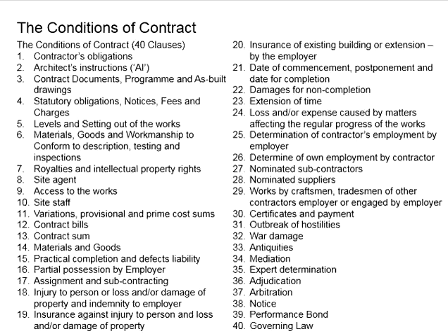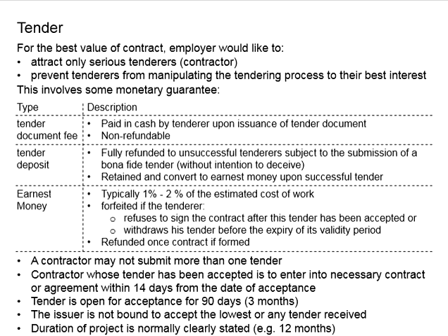In fact, before this, we also discussed the tendering process. Assuming now this is a real project, there will be a tendering process, award of the project, commencement of the project, until the completion of the work, and then enter into the defect liability period. In case there are defects, the contractor will need to make good of the defects to clear off all the works that are supposed to be delivered to the employer as stipulated within the contract.